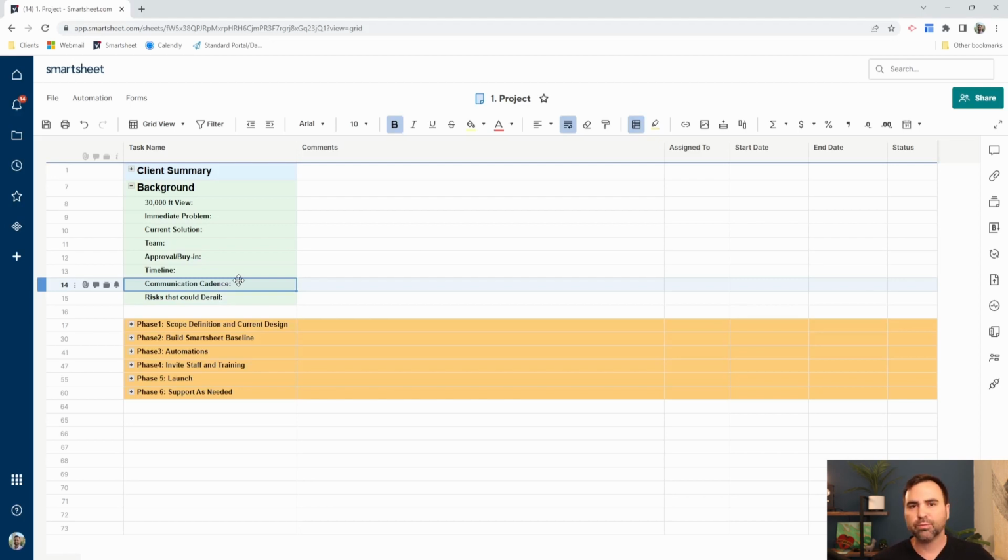And then I just talked really high level about any risk that could derail a project. It could be a loss of funding. For instance, if it's a governmental organization, is there any risk that they're going to drop their funding and cancel this project? Other risks would be if it's an office, do they have any other projects that are going to step over this project or become a higher priority if we don't get this one done quickly? So conversations around risk in your own organization are going to help everybody understand that this is a serious project that everyone needs to work towards.